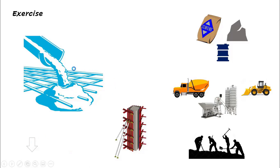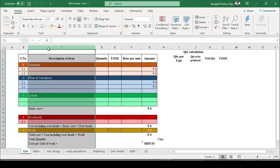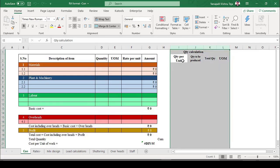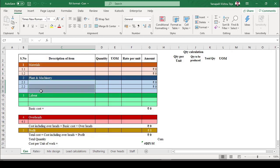Let's go to the format. This is the typical format for rate analysis. The columns are: serial number, description of item, quantity, unit of measurement, rate per unit, and amount — where amount equals quantity multiplied by rate per unit. There are five heads: Materials, Plant and Machinery, Labor, Overheads, and Profit. Before adding resources, we must list them out to ensure no duplication and nothing is missed, and always specify the unit of measurement.